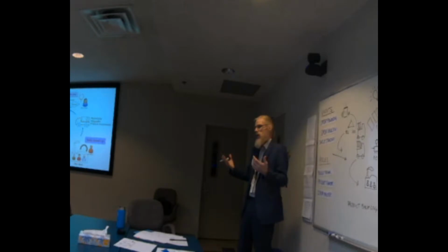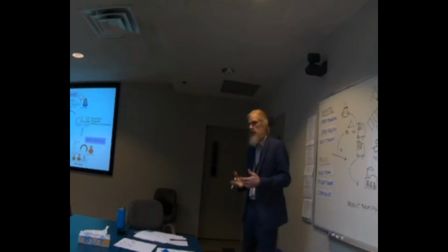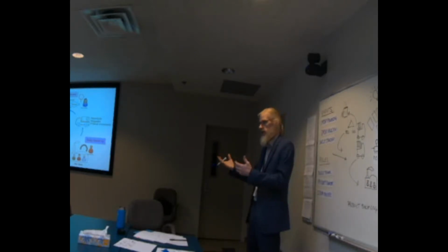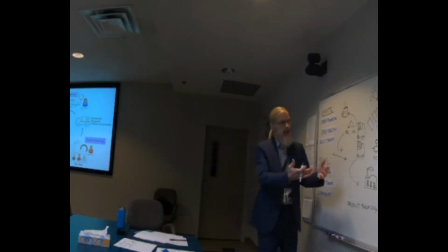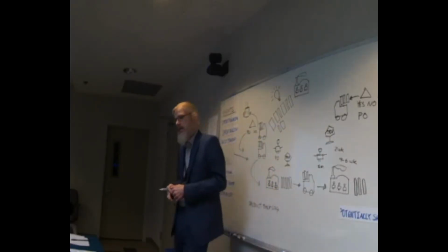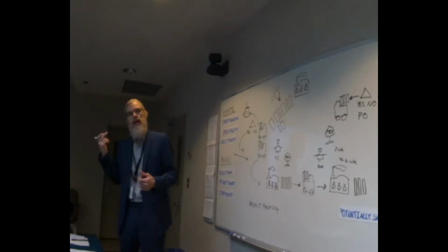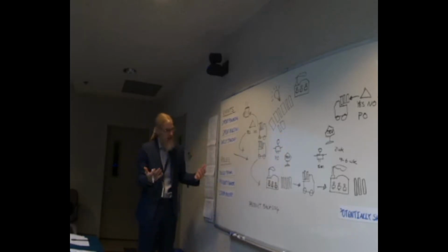I wrote this software for quality technicians to be able to record their test results and take a decision, a usage decision we call it, to say this is good material. But we showed this to healthcare and they said, we love this, but we need a two-part digital signature, because we're under FDA rules. This is a regulated product that we use. So we say, okay, we've got to go back and write another story. This is something that we will look at for future sprints to include in the software as well.